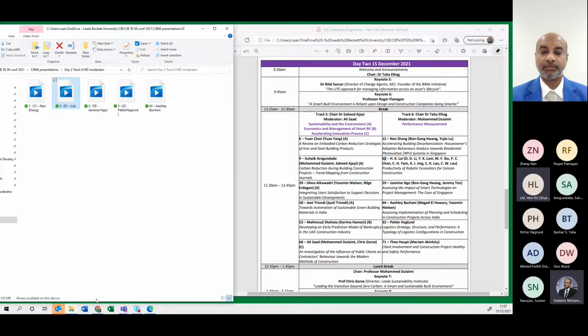But we studied that in the same site, of the same size, we can put in a maximum of 3 sets of resources for the caisson method. So that's why we take this as our case study, to first figure out whether our method is competitive with the bore pile method. May I answer your question?